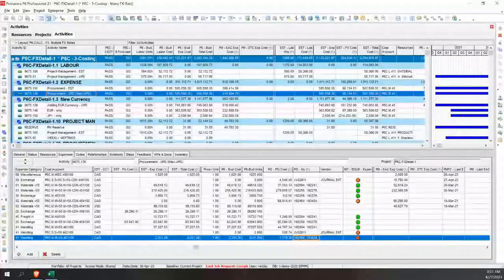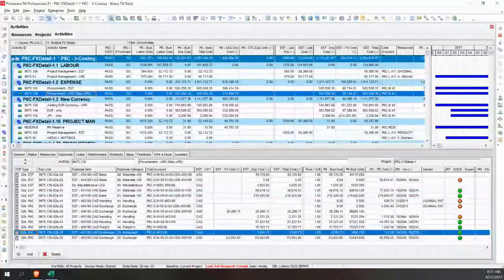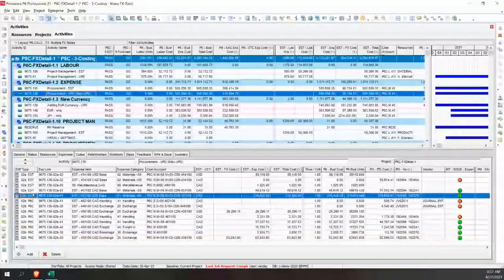We've got PM estimate at completion expense cost. That's rolling up to the activity. So the total will go in there. So that's this column. So these are roll-up values that can be done automatically on the fly. So let me go ahead and put an estimate to complete on one of these line items. And we usually use the estimate line items. So these are the base estimate line items. So I can put an estimate to complete inside of here.